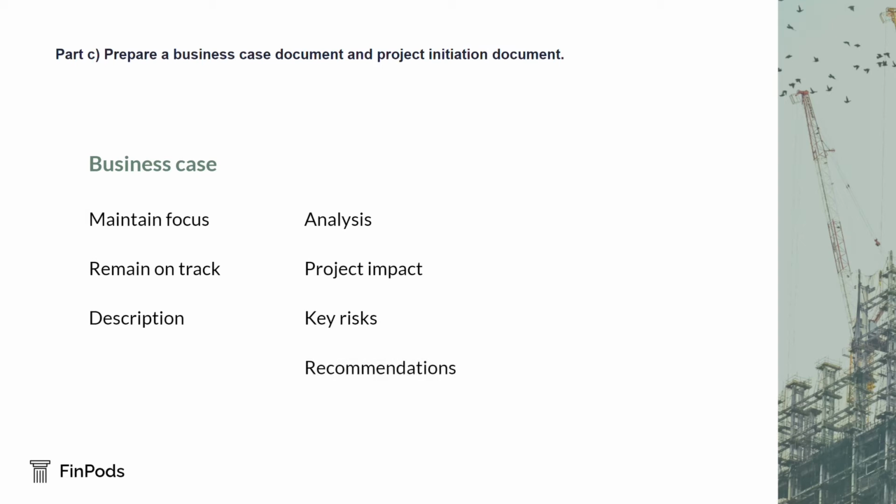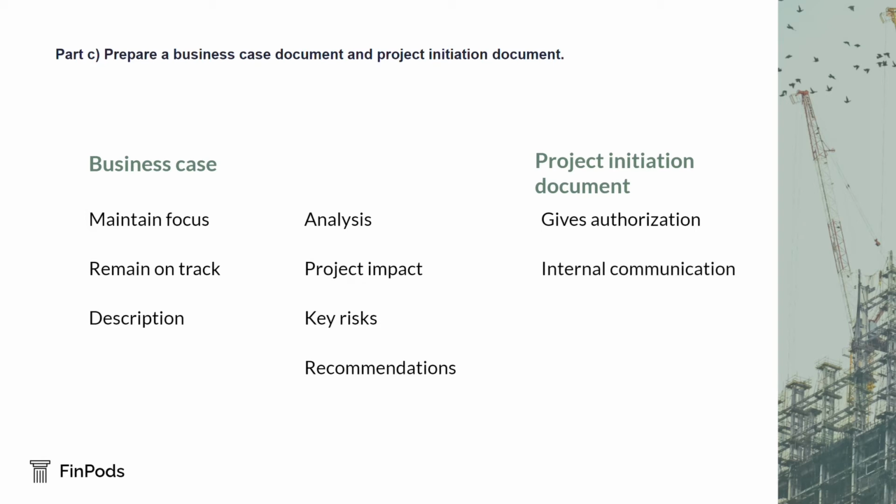The project initiation document, which is known as the project charter, complements the business case document. While the business case explains the need for work on the project to start, the charter gives authorization for work to be done and resources used. The project initiation document also has an important role in internal communication within the organization, since it can be given wide distribution in order to keep staff informed of what is happening.